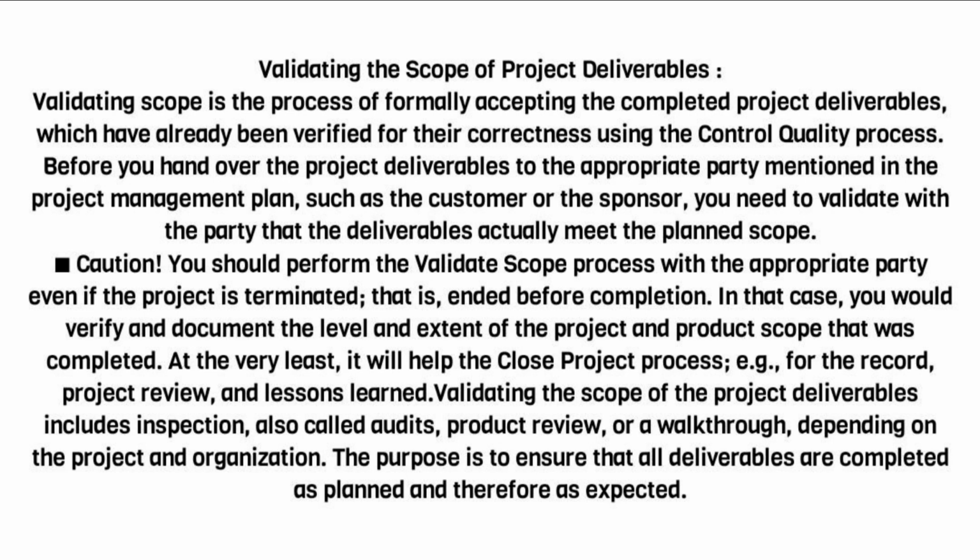review, and lessons learned. Validating the scope of the project deliverables includes inspection, also called audits, product review, or a walkthrough, depending on the project and organization. The purpose is to ensure that all deliverables are completed as planned and therefore as expected.